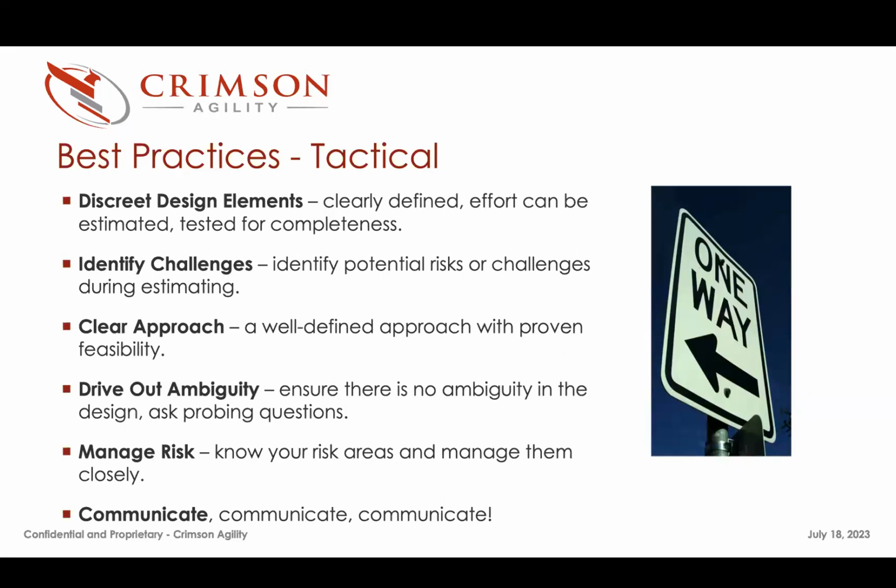Identify those early, address them early, look for ways to simplify if you can, look for ways to maybe introduce a change request. But identify those challenge areas early, get started on them, because those are likely the areas that are going to pose project risk.